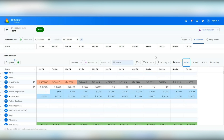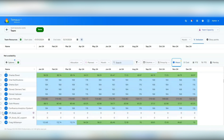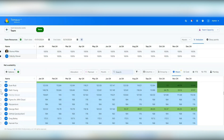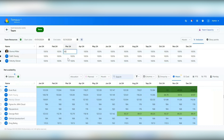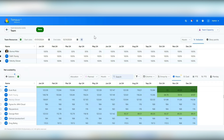I'm going to keep it in hours and select a few resources — Donna Miller and a couple of others. As I select these resources, they show as grayed out in the bottom and populate at the top, just like the built-in functionality. You'll notice it says 100% for every resource — this tells you how much of their time they'll be spending on that team. You can change this if you have permission. For example, Donna Miller might be 100% for the first two months, then 50%, then 30% in April, and not available at all in May. We also don't limit the number of teams a resource can be assigned to simultaneously.